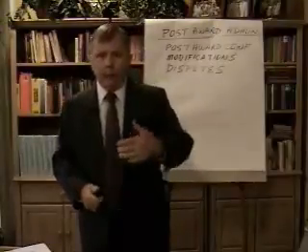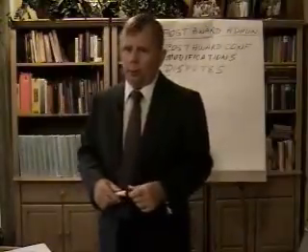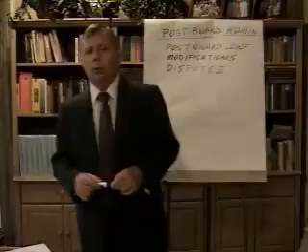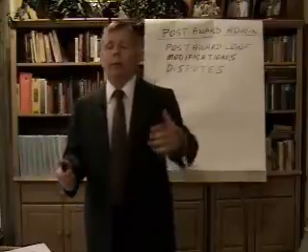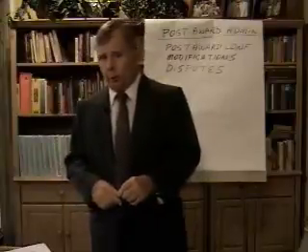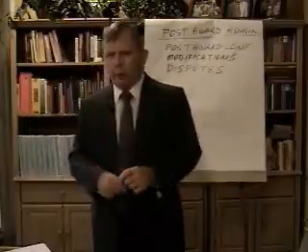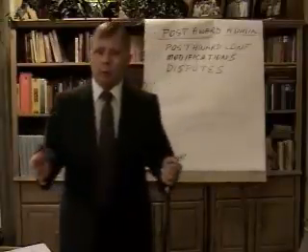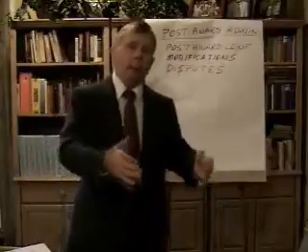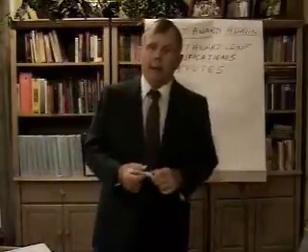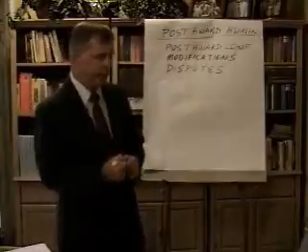If it becomes a formal disagreement, it may have to go to a Board of Contract Appeals above the contracting officer to make a determination how to resolve the dispute, which then would require a modification and a change to the contract.